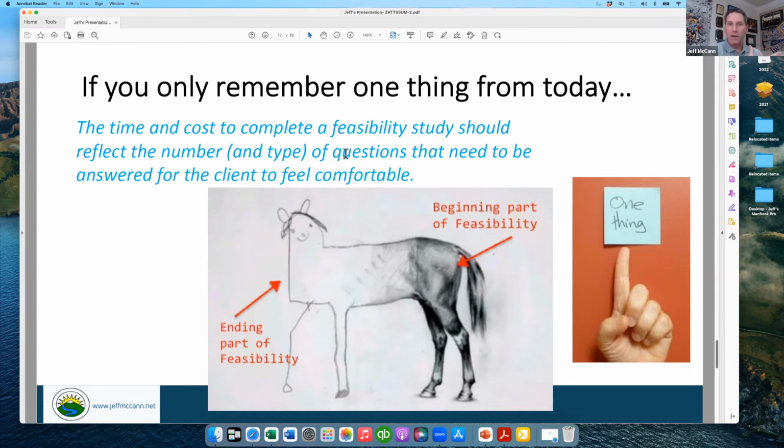But if it has more issues, no reports, no studies, it's not unusual for me to need 30 or 60 or 90 days. And I usually say I can do my report within about a week of getting the information to do the report. If we need an arborist, if you're going to do a project in Seattle or Mercer Island, you may find you're going to design your home around a particular tree. So what is a significant tree? What is the type of tree? All those things you may need to get some individual to go take a look at.